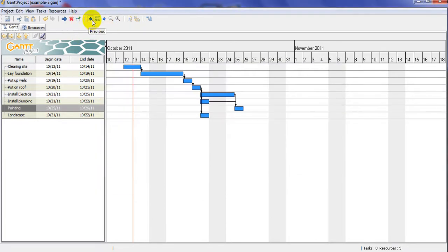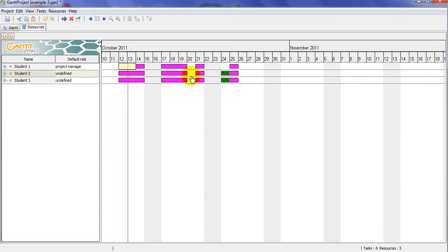So this is a very important tool to verify how much of the manpower is being used. Of course, in terms of students, perhaps if you're booking the project, maybe you consider only 100% of the time that you can allocate per day. So it doesn't have to be 12 hours or the entire time. We call it 2 hours and 100% of that 2 hours basically, and maybe someday you cannot do that. Okay,